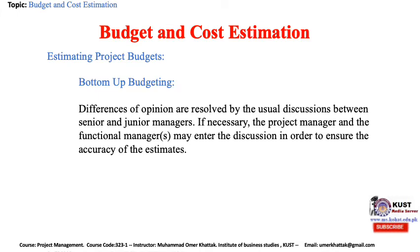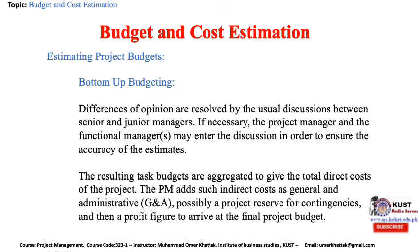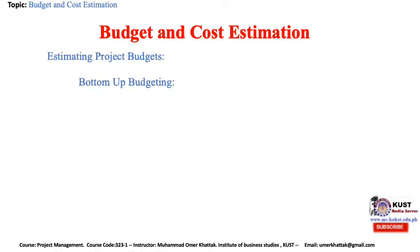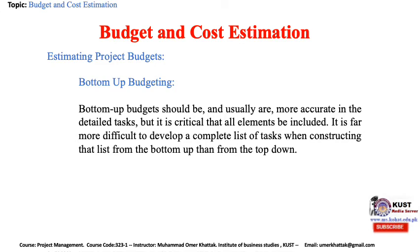Differences of opinion are resolved by discussion between senior and junior managers; if necessary, the project manager and functional manager may enter the discussion to ensure accuracy. The resulting task budgets are aggregated to give the total direct cost of the project. The project manager then adds indirect costs such as general and administrative charges, possibly a project reserve for contingencies, and a profit figure to arrive at the final project budget. Bottom-up budgets are usually more accurate in detail, but it is critical that all elements be included. It is far more difficult to develop a complete task list from the bottom-up than from the top-down.